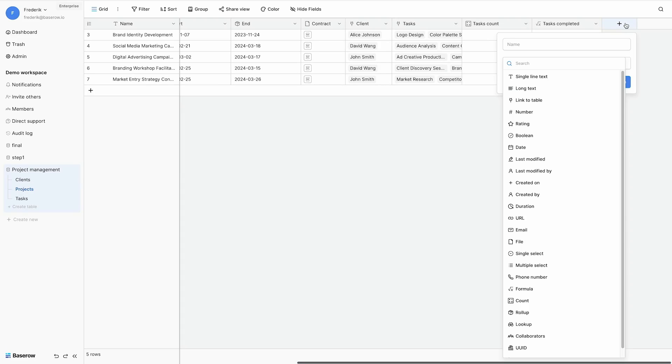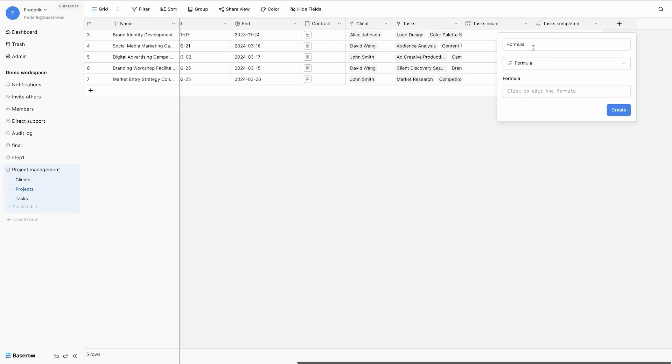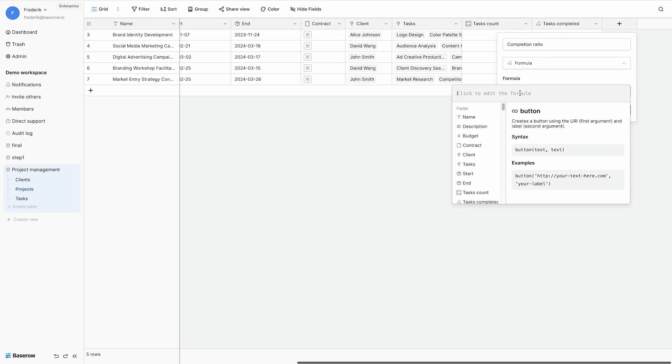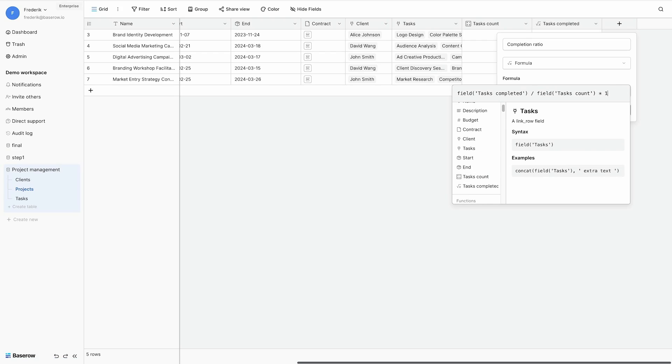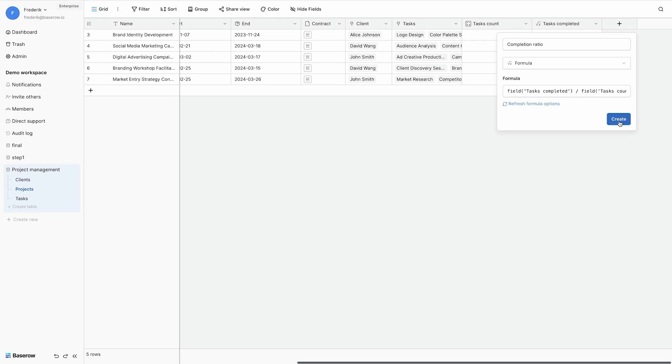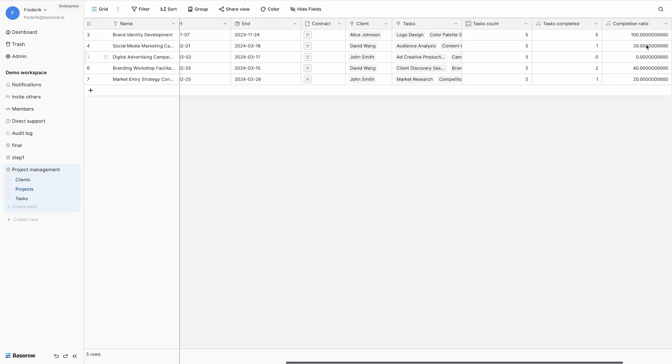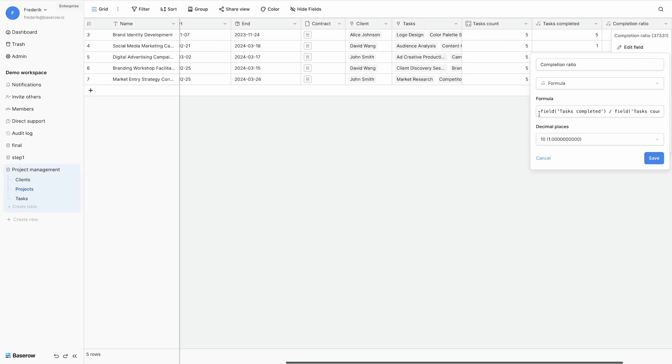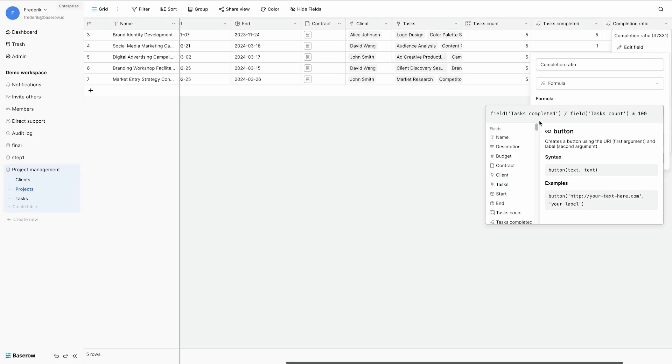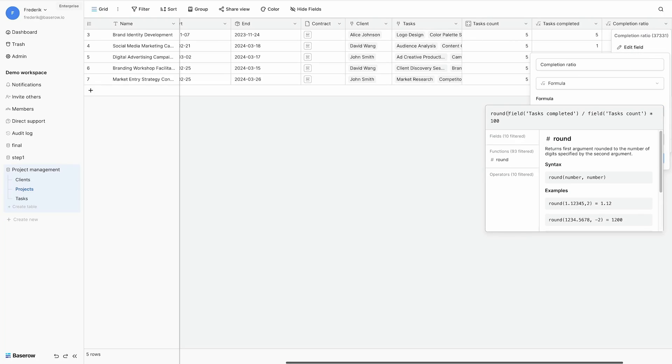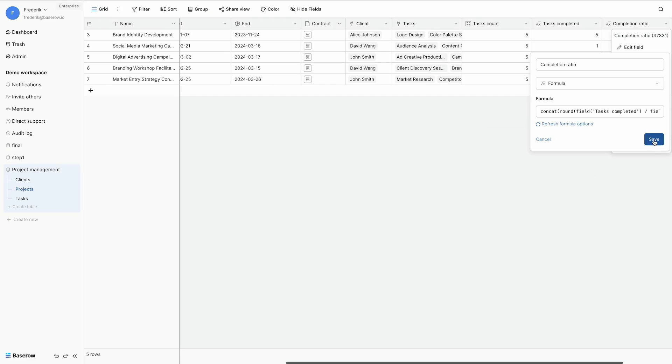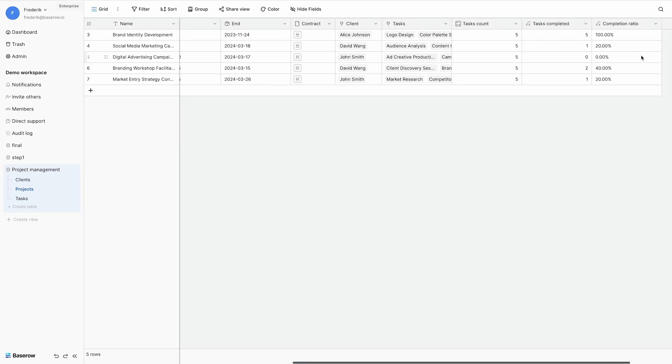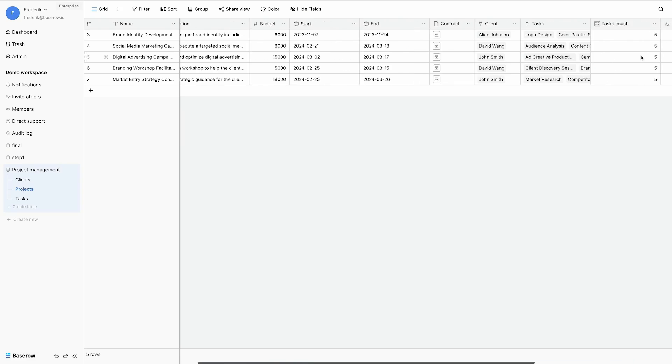Let's calculate the completion ratio of the task. So how many percentage of the tasks for that project are completed. Well I simply divide task completed by my task count. And I multiply by 100 to get percentage. There are a lot of decimals. Let's remove the decimals with the round function. And say I want to see two decimals. If I want to see percentage sign after it, I use the concat function again. Add the percentage. And now I get my ratio with percentage.